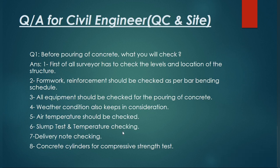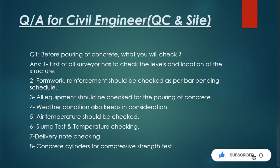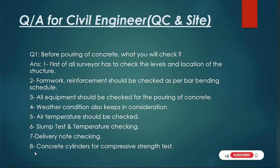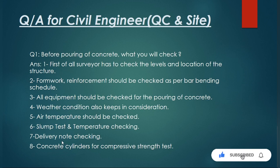On arrival of concrete, the delivery note should be checked for the loading time and for the tests performed. Sometimes we have to do a slump test and check temperature at the batching plant as well, so you need to verify the delivery note. You have 90 minutes to cast the concrete — the 90 minutes starts from the loading time.